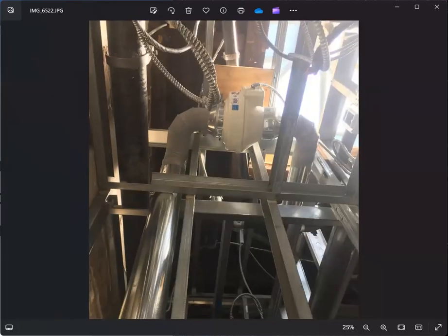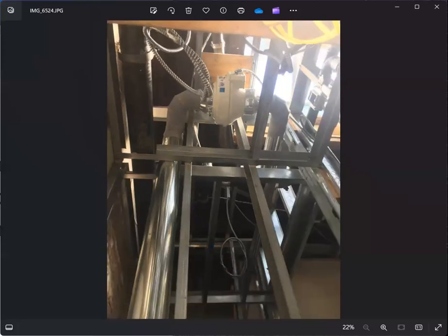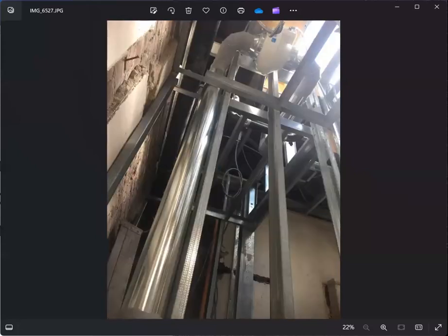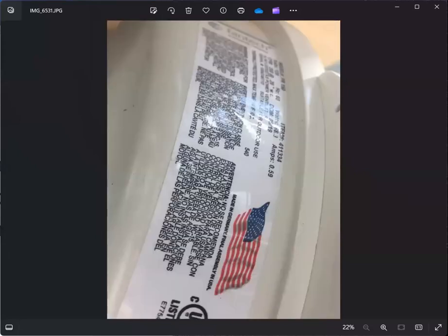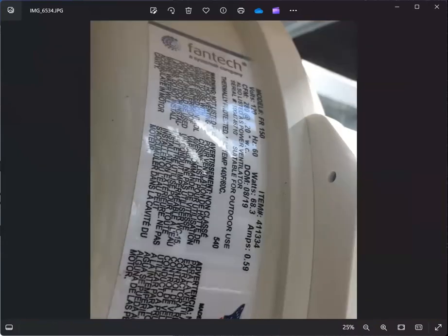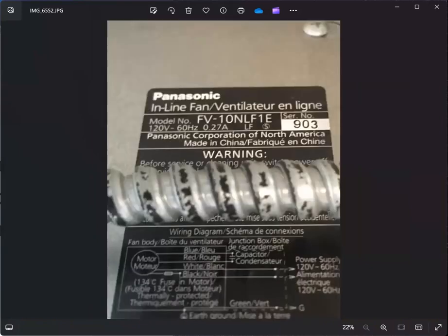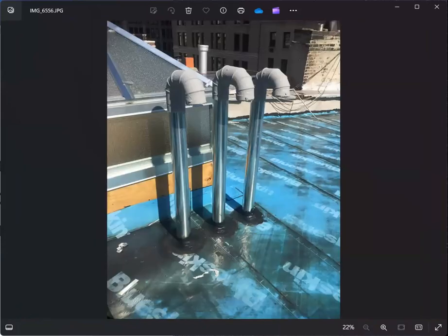Dryer exhaust, in a certain apartment, it's for the laundry exhaust. So this unit, as long as it's open, because in the long run they're going to put the ceiling, the sheetrock, this is going to be a good inspection time to identify those model numbers and manufacturers of equipment and to verify if it's according to the drawing, according to the approved submittals.